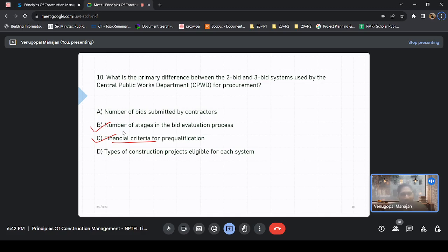You already said that one of the stakeholders is Adani. Obviously, the company is managing a lot of airports now. So there has to be some financial criteria also: are you even capable of delivering that project or not? The cash flow should be consistent as well. Yeah, definitely. So those things are in the 3-bid system. So the middle one is financial criteria.